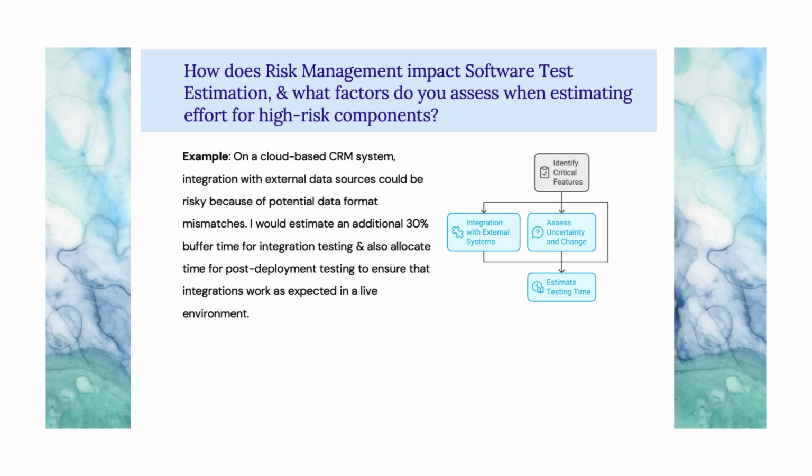On a cloud-based CRM system, integration with external data sources could be risky because of potential data format mismatches. I would estimate an additional 30% buffer time for integration testing, and also allocate time for post-deployment testing to ensure that integrations work as expected in a live environment.